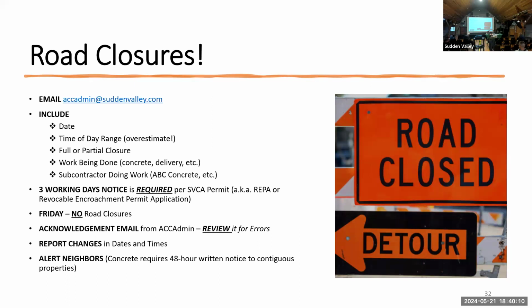Of course, with concrete, you have to. And are we going to talk about that, Joel? The concrete in particular? That's a 48-hour notice in writing to the neighbors that are next to you and across the street, anything around you. You have to notify them in writing, and there are little forms available on the website that you can use to do that.